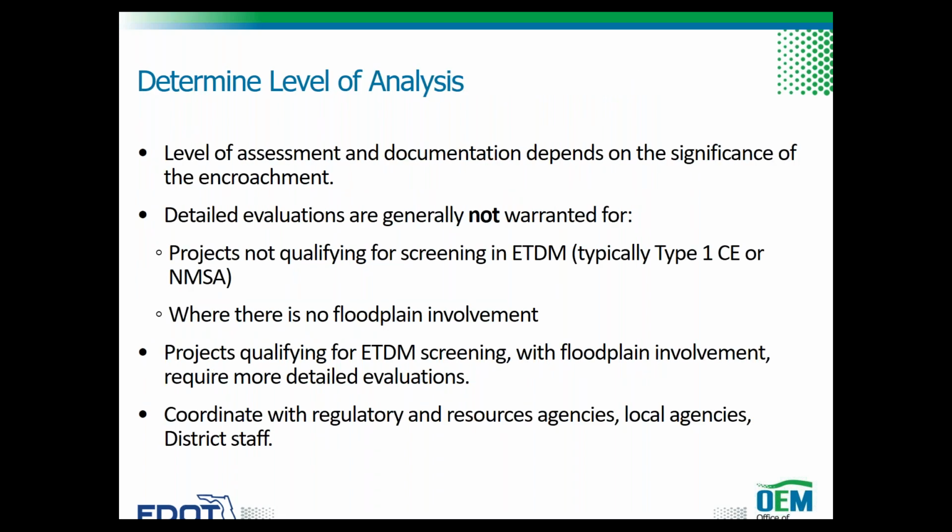The level of assessment and documentation for potential impacts to floodplains during the PD&E phase depends on the significance of the base floodplain encroachment. A location hydraulic study is not required for projects which have no floodplain involvement. Detailed evaluations are not generally warranted for projects that do not qualify for screening in the FDOT's Efficient Transportation Decision-Making process. These projects are typically Type 1 categorical exclusions or non-major state actions. Projects qualifying for ETDM screening and having floodplain involvement will require more detailed analysis.